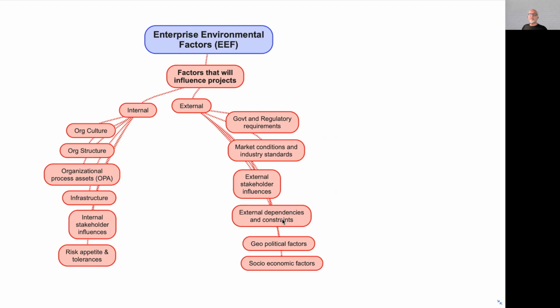I should not start a project in December in the USA because people will be on leave. During Ramzan, I should not start a project in the Middle East because people will be fasting. So I must be aware of these things, and of the labor laws. These are all examples.